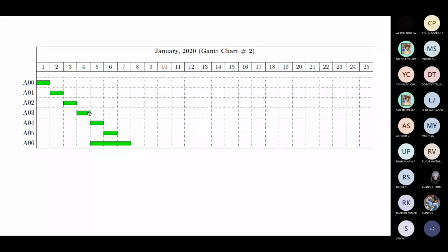So once the excavated earth is done, and we are not sure this happens, we assume that A04 does not happen based on our experience and also from the weather report, or from a scientific document from a government agency. The stratum is hard, and there is no water table percolating into the pit. In that case, after the excavation itself, you can start the PCC laying.